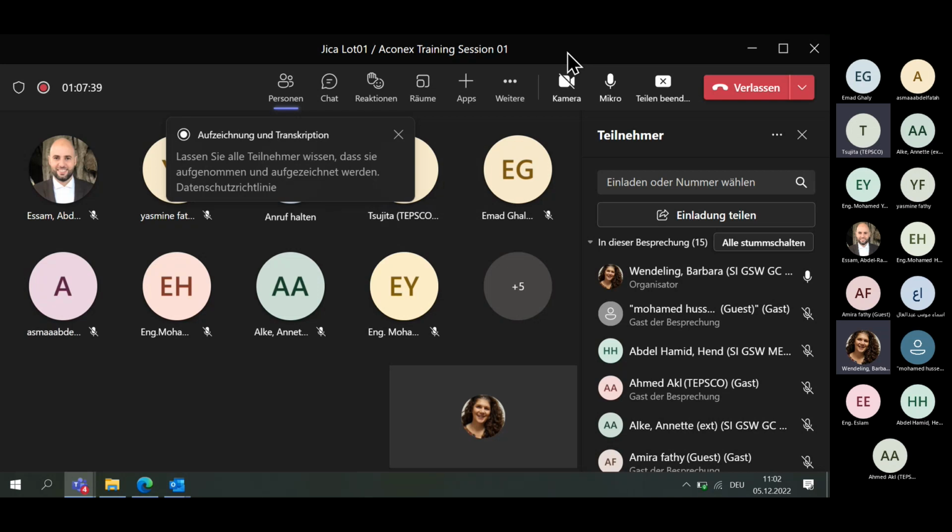This is possible, but only under supplementary file. This should avoid that anyone can change a document in the workflow and nobody notices that a document changed. And if I have documents under the supplementary sheet, I will notice there are new documents in the supplementary sheet. There is anything changed from customer side, or engineer side.